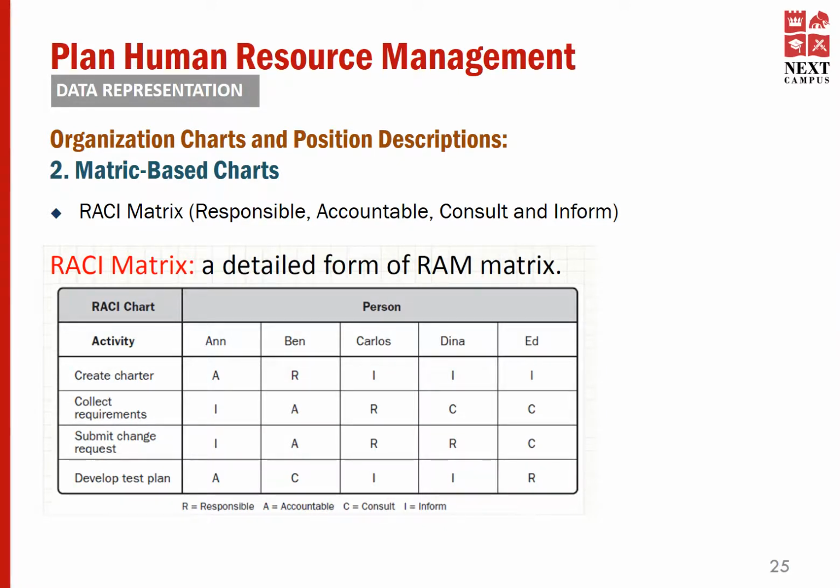Carlos is responsible for collecting requirements. Who is accountable? That is Ben. Ben is accountable for collecting requirements. Anne is informed, and Gina and Ed are consulted in terms of this particular activity. So it's crystal clear who is doing what. Once RASI is defined, it creates a lot of clarity in terms of understanding how the resources will be allocated during the project.